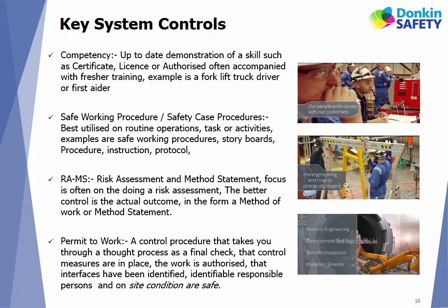Do you need a permit to work? This is again a controlled document for high-risk activities. It will take you through a thought process to ensure you have all the right controls in place before you start.